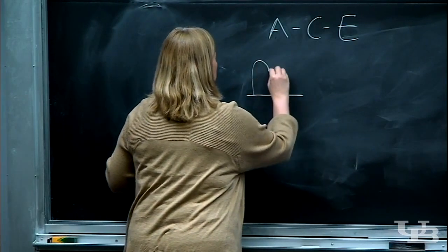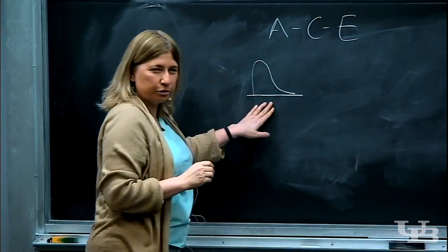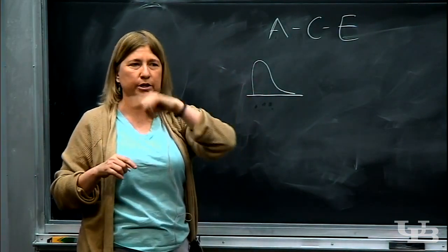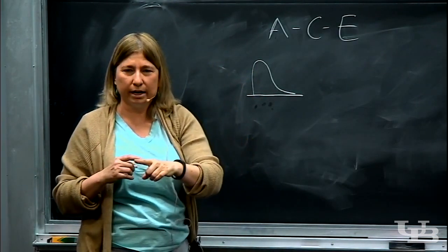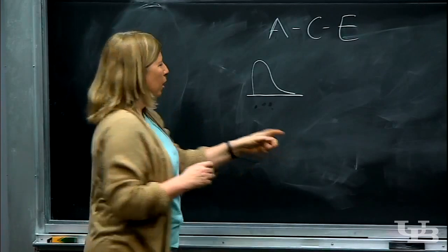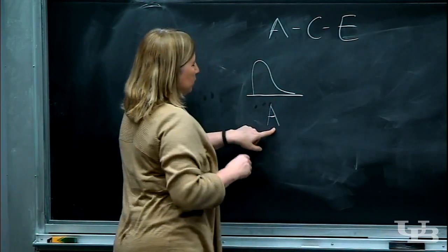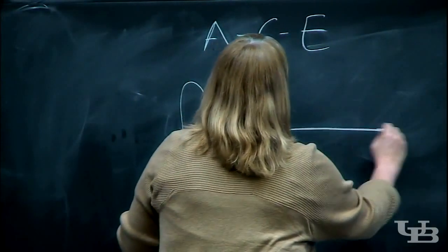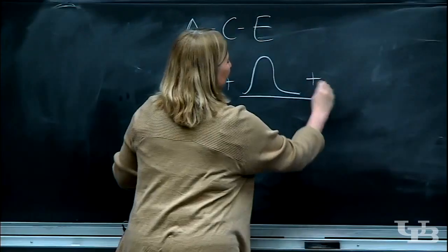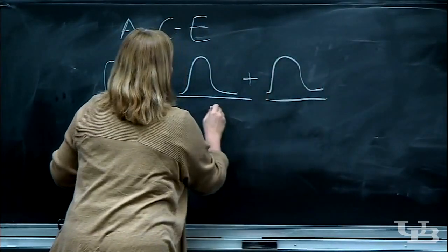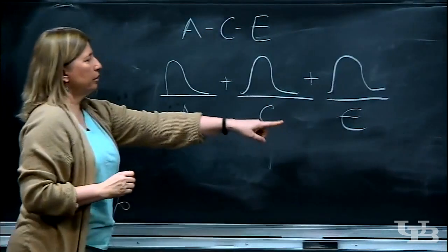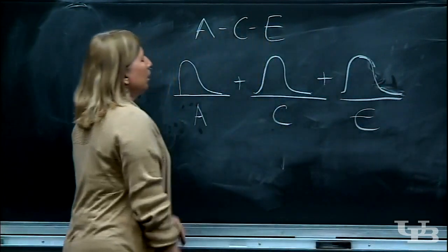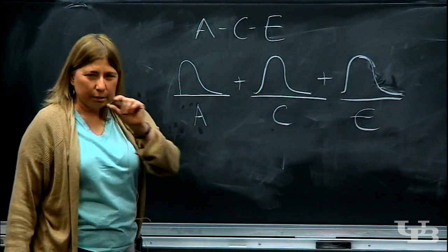a project, they're based on a beta distribution representing the uncertainty concerning the task, a beta distribution representing the probability of any possible outcome with that task. Right, that's where we got those formulas. Okay, so there's this little beta distribution, and it represents what will happen with A, how long A will be. The path is the result of sort of a necklace of 3 beta distributions, one for A, one for C, and one for E. That doesn't look all that skewed. Remember, the beta distribution is the lopsided one. Okay, that was all before spring break. That was concerning just the tasks.